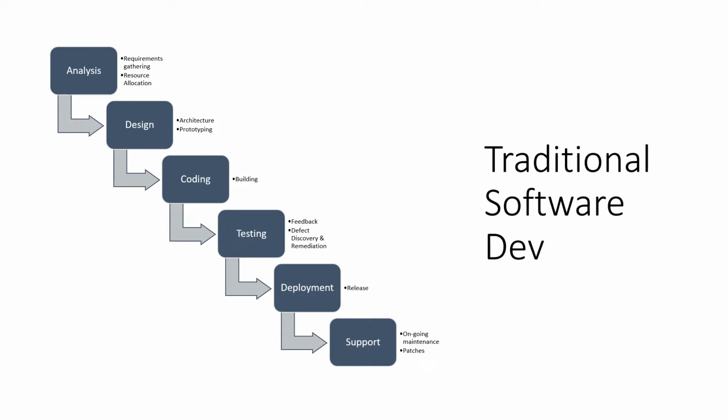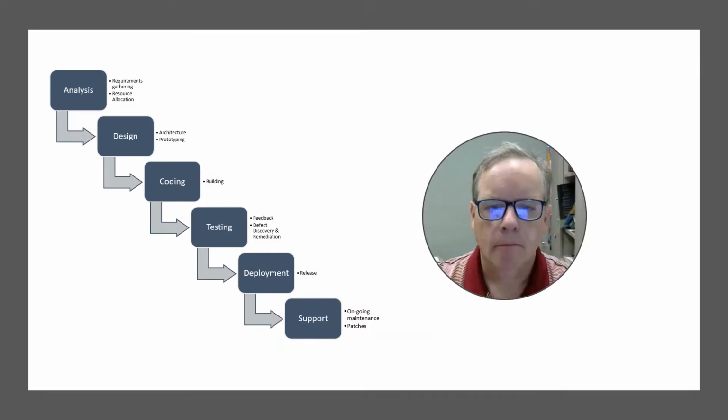This represents what we would call a waterfall model, also a traditional project management model. The idea is that by doing the due diligence up front, costs would be further saved down the line. For instance, if we can determine before we write a line of code what the user interface will look like and how it will work best, then we can avoid having to redo it later in the process when we have to retrain the workforce or suffer the consequences of doing change management more than once.